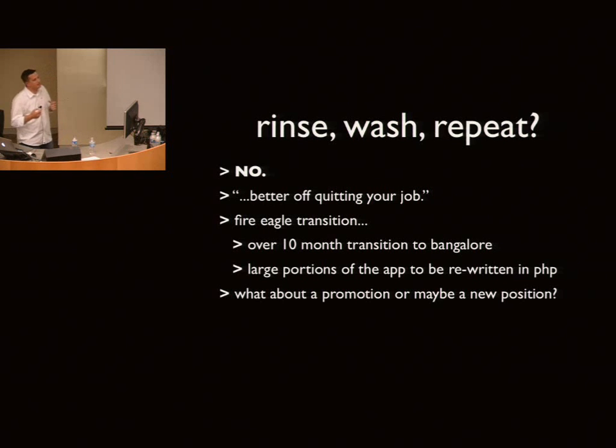But before he could take that position, it took him 10 months to transition this to a support team in Bangalore. So for an application that took 4 months, it took him 10 months to be rid of this thing. And a large portion of it is going to be rewritten in PHP so that the team can support it better. He said, unless you have a really solid team that you can dump this on when you're done,